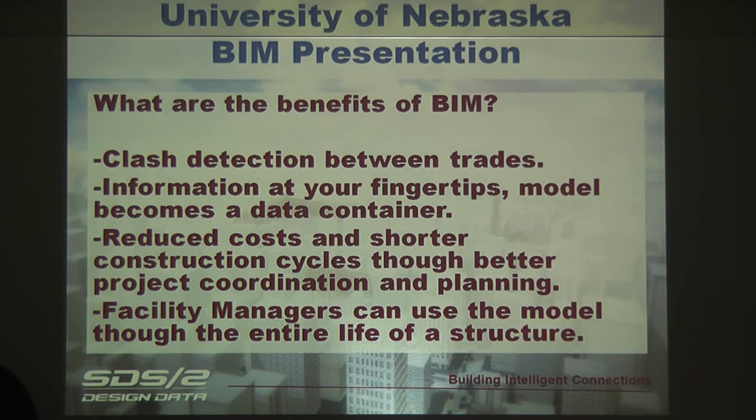Let's say the handrails outside are galvanized, or maybe they're structural steel of some type. We know that's going to have a 7-year life cycle, and then the posts are going to rust out and have to be replaced. They might use that level of information inside the model to say this has a life cycle of 7 years, so they put it on a schedule and know these items within the building will have to be replaced at this year, month, or quarter.